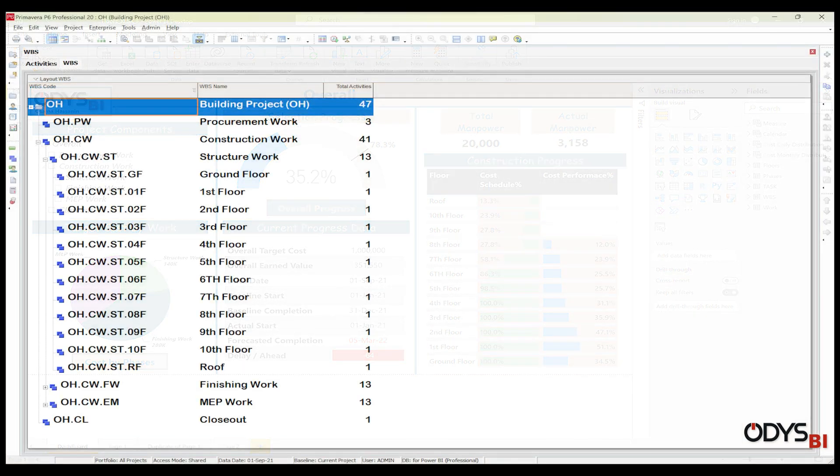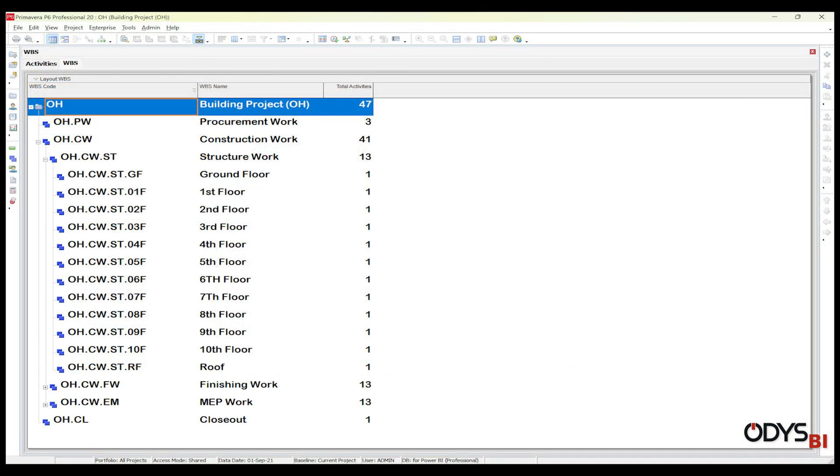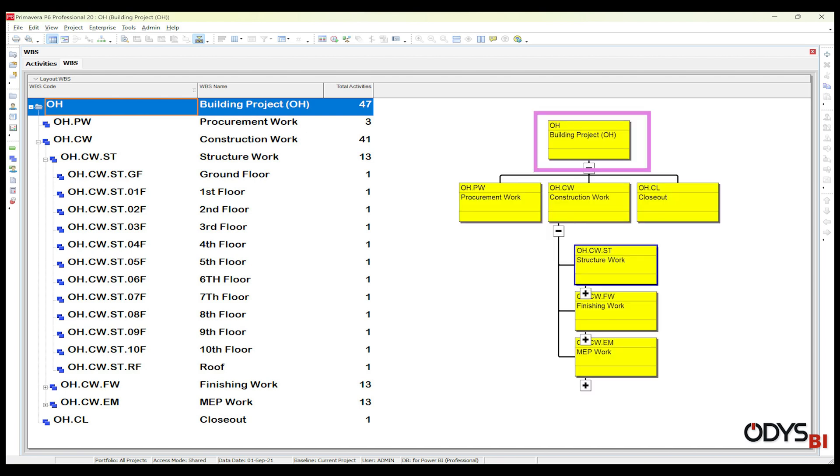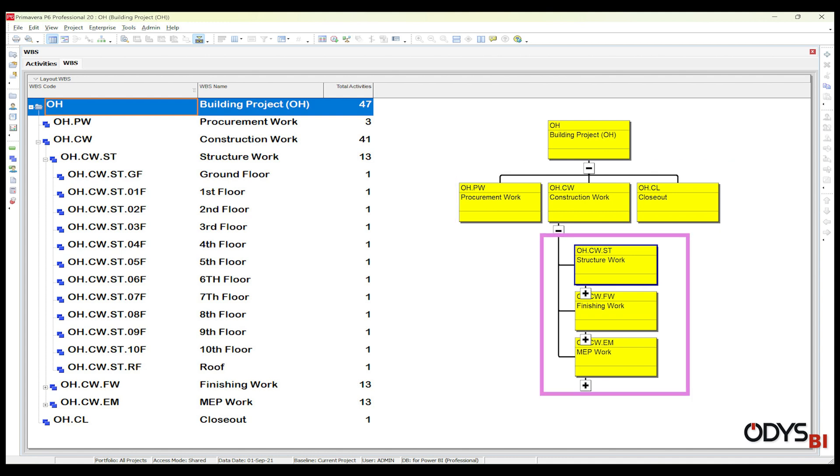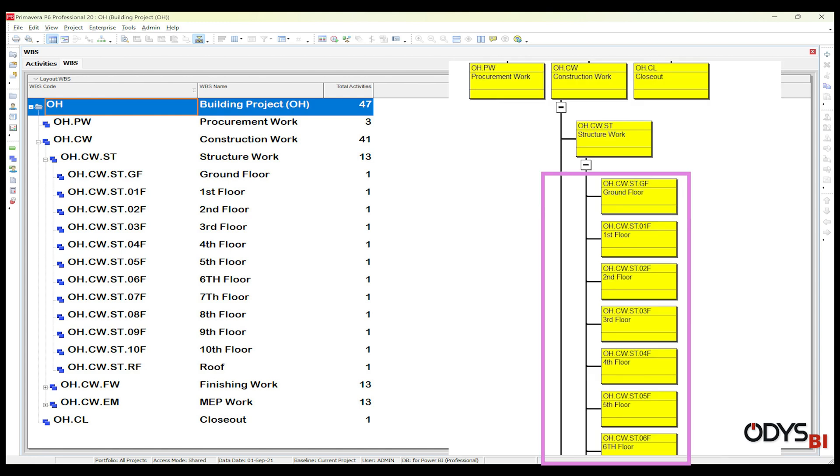If we review the WBS in Primavera project, I have four levels. The first level is the overall project, the second level is phases, the third level is the work, and the final level is the floors.